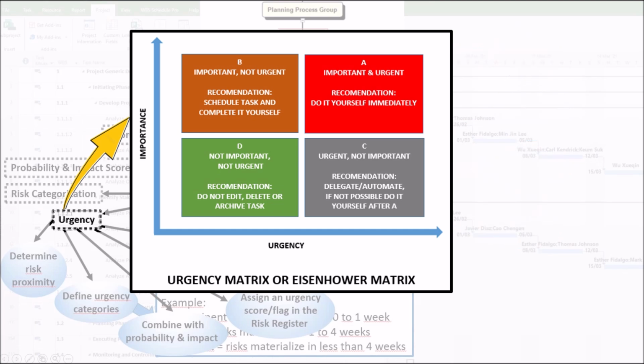In which phase of project development is it used? The urgency matrix and urgency assessment are most valuable during project execution and monitoring and controlling. But they are created during the Perform Qualitative Risk Analysis process, typically in planning, as follows. First, in the planning phase, initial urgency is assigned to each risk based on estimated occurrence dates.